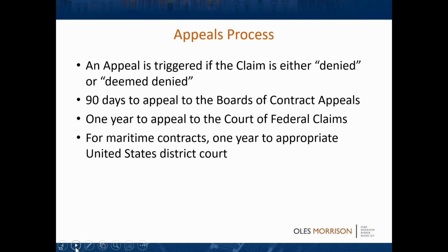As far as going to the court or the board, we could talk for a day on that. I mean, in general, it's just less expensive to go to the boards, and most people go to the boards. If it's a maritime contract, though, and you want to go to a court, you can't go to the Court of Federal Claims. You've got to go to district court.